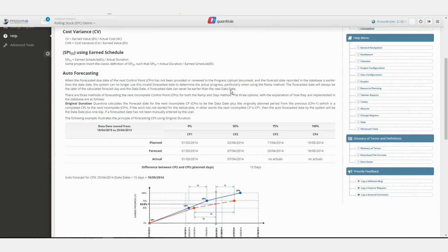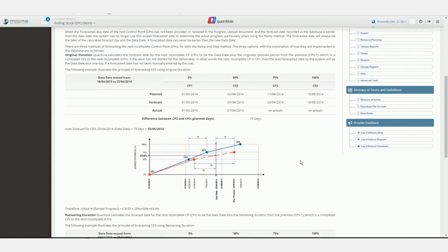The calculations themselves from there on follow standard earned value methodologies, where we use control points with their values assigned to a date at which we plan to achieve them and at which we actually achieve them. Note that in this instance we have planned. In actual fact, planned diverges into two separate ways, namely originally planned and currently planned.